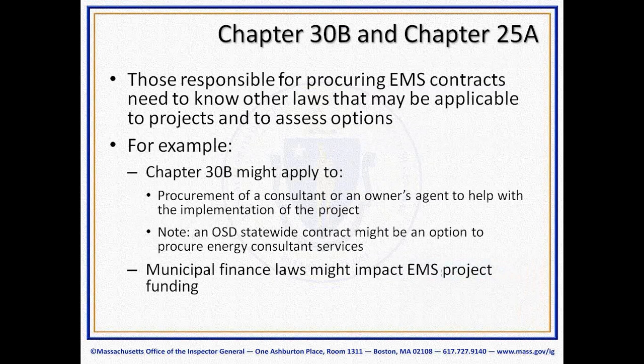Those responsible for procuring energy management system contracts need to know that other laws might be applicable to these projects and to assess their options. For example, Chapter 30B might apply to the procurement of a consultant or an owner's agent to help with the implementation of the project. Also, keep in mind that in OSC, the statewide contract might also be an option to procure energy consulting services. And municipal finance laws might impact EMS project funding.